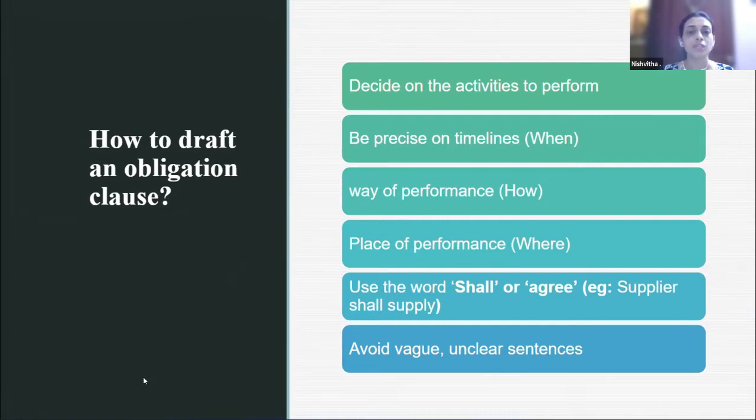Okay. First of all, when to perform. When, very explicitly call out the timeline. Few contracts are date specific. Like I want you to be in Bangalore on May 1st, okay? And I want you to be at the DJ event. It's date specific. Your date is non-negotiable in nature. If that's the mandate, check on that and mention it in your agreement.